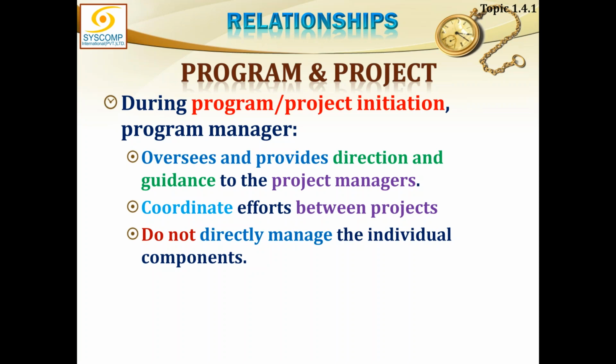Although from the monitoring and evaluation point of view, you may have to collect certain data. Sometimes people even hire a third party to audit the project manager. That is a fair way of doing it. That is very fair. But poking your nose into each and every affair of the project manager will actually harm the performance of the project manager. He will no more remain independent. But to guard against wrong reporting by the project managers, you may hire a consultant or a third party to audit the project, which will keep you abreast of whatever is happening in the project.